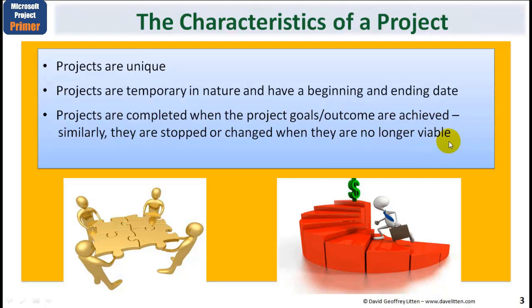The word viable here refers to the business case. And a business case is basically a balance of the costs, risks and time on one side against the benefits being achieved on the other. And if for whatever reason the business case is no longer viable, then the project should be stopped, to avoid continuing to waste any more resource or effort on something which has no longer any business benefit. Or it might be they need to be changed in some way, perhaps rescoped, so that the business case would be viable if you now continued with the project in a changed way.